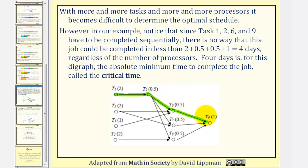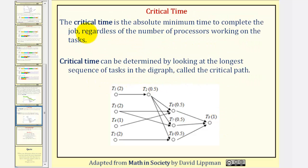Looking at the times of each task, notice there is no way to complete this job unless in two plus 0.5, plus 0.5, plus one, or four days, regardless of the number of processors. Four days is, for this diagram, the absolute minimum time to complete the job, which is called the critical time. The critical time is the absolute minimum time to complete the job, regardless of the number of processes working on the task.